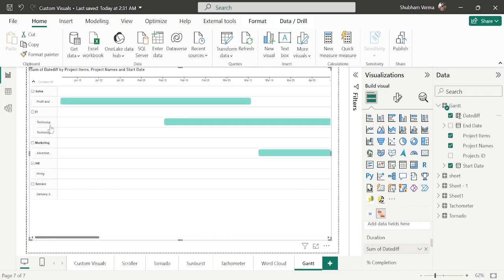So let's talk about this profit and loss item. If I hover my mouse here, now we can see it is also calculating the duration. So the project will start 1/10/2023 and it will take total 62 days. If you observe it here, it automatically calculates the end date, which is 3/13/2023. And now let's go back to the table view to understand this tooltip in detail.